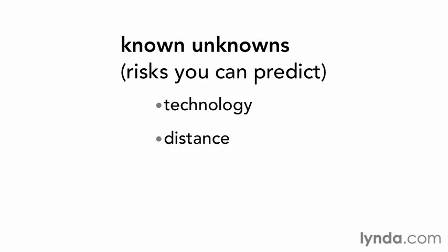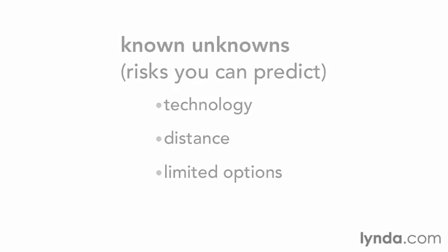Time zones and travel can result in delays. Language and cultural differences can lead to miscommunication. And remote teams might have trouble building effective working relationships. Limited options, like having only one supplier, can increase risk because you don't have alternatives if something goes wrong.